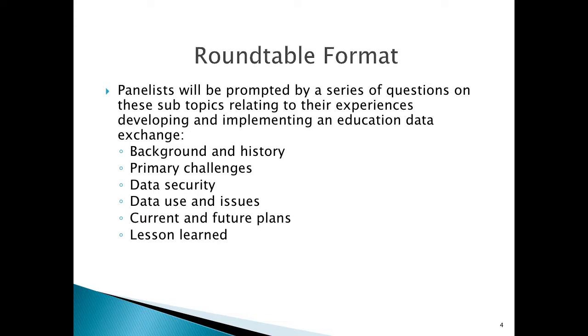The committee reviews them and asks questions to determine what effect, if any, that change will have on various other components of the system. Once that committee approves the change, it goes up to the executive level for program and for ITS, who will review the changes and prioritize them.